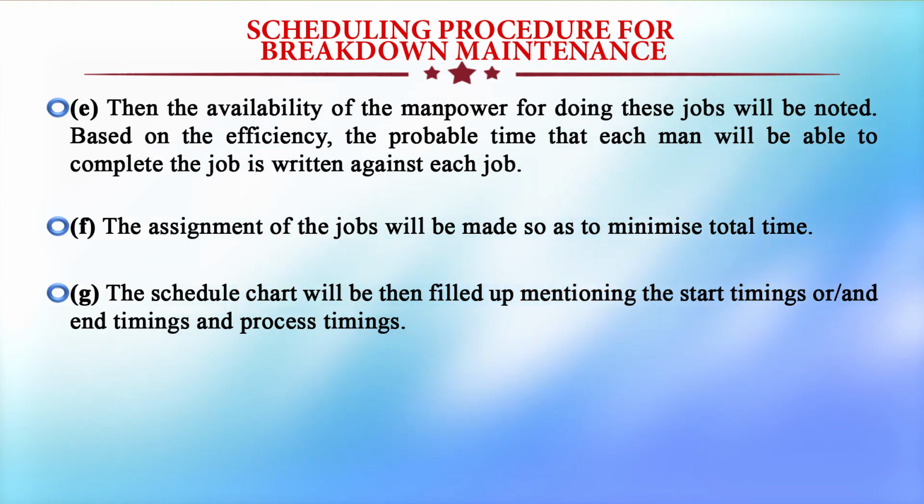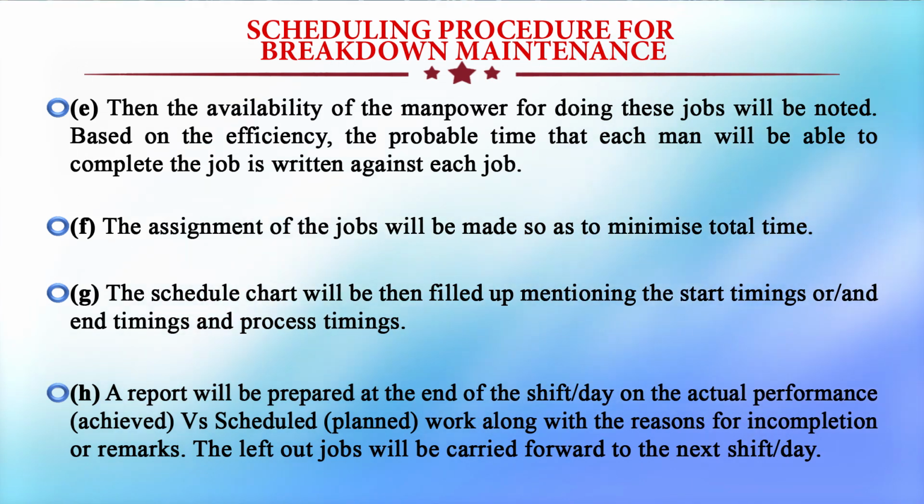A report will be prepared at the end of the shift or the day on the actual performance achieved versus scheduled or planned work, along with the reasons for incompletion or remarks. The left out jobs will be carried forward to the next shift or next day.